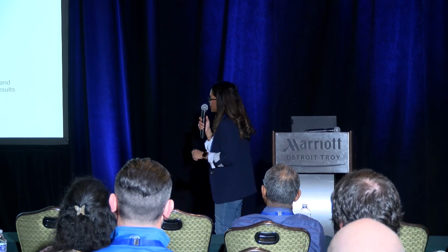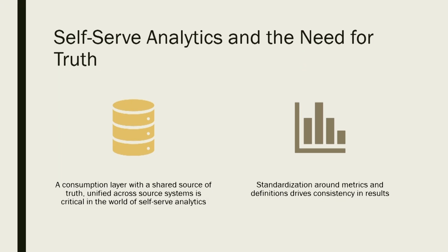The other thing that helped with this is to create what we call the intakes. Anything that you want with data, new data, existing data, or I don't know where this data is, but I want to get my hands on it. All of those are requests for data. And we want people to go self-service themselves, right? That's the whole idea. But we also want them to fill out a form that somebody on the team looks at and says, okay, you're asking for this. This is readily available, go get it from here. Or this doesn't exist and it's going to take 3 to 5 business days to get it for you. Or it doesn't exist at all, it needs to be a new data pipeline and we're going to create it for you.